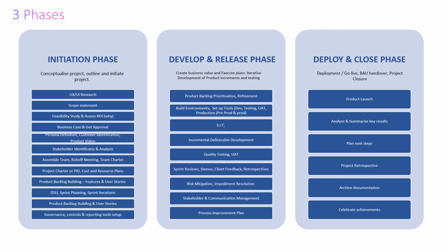Now, project charter states what you want to achieve, and the few people that will do things there. And so your project charter does not have the details that your PID has. But what we do in Agile, rather than having a PID, you find that many organizations just use the project charter, because in some organizations it wouldn't be more than 2 pages. Some could be up to 5 pages or 10 pages. But we don't need project charter to be voluminous.